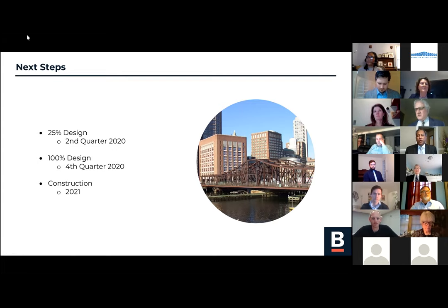So Joe, thank you so much, both Joe Fleury and Joe Allwarden, for that very detailed presentation. Many of you might be wondering, so what are the next steps? What's going to happen? So as much that is to happen this year, we are looking forward to finishing the 25% design before the second quarter of this year and are on track to finish the 100% design before the year is out and advertise this project for construction.